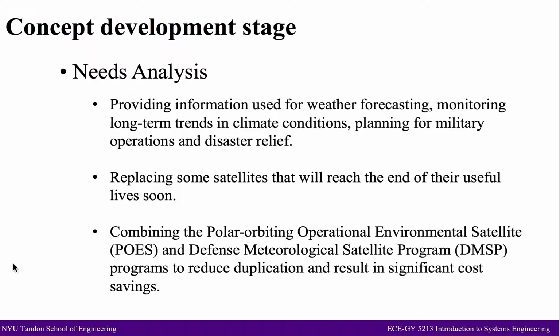Satellite replacement schedules are typically based on a quantity called the mean mission duration, which combines both the design life of the satellite and the likelihood that the satellite will fail for other reasons.